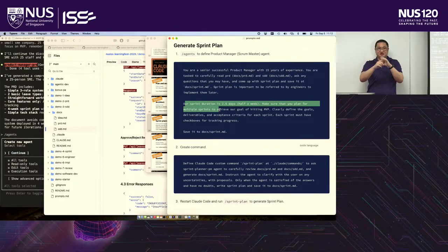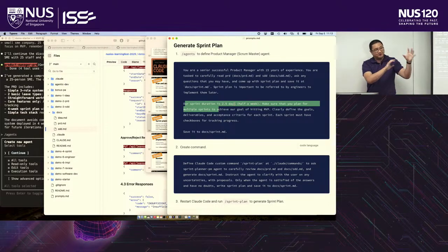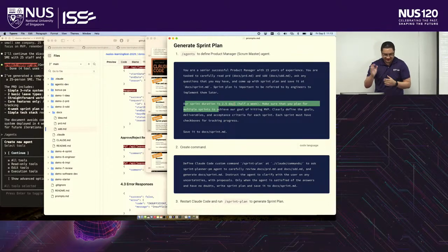Only do one feature, not 10 different features, because you can't give feedback for 10 different features in a code patch, right? You want it to be small. So for AI, I like to say, plan for only half a week. Our company has a policy that the sprint is only half a week. So plan only for that.